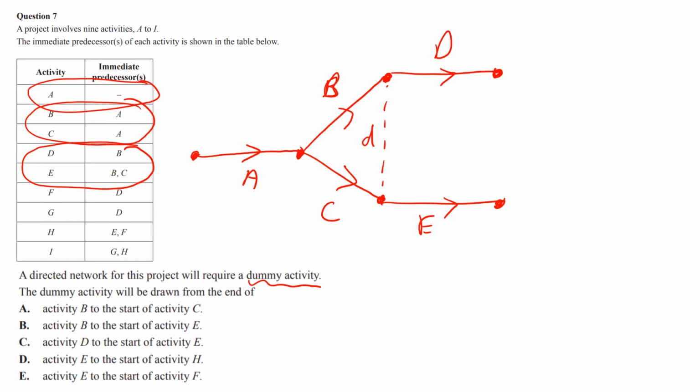Now it tells us that D must go only to B. So if you're going from D, you go backwards through B to A, but we can't go backwards through the little d. So we've got to put the arrow that way, and so only the yellow path follows backwards for D. Let's try seeing if that works out for E.